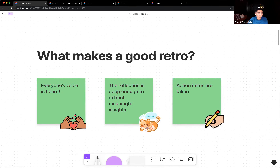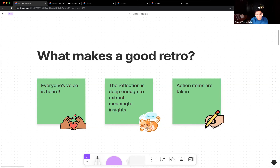What makes a good retro? Three things: one, everyone's voice is heard. Retros on a digital canvas really help with that — silent time for everyone to put their own ideas means no single voice dominates the room. Two, the reflection is deep enough to extract meaningful insights — the right prompts help you think about the problem from multiple perspectives. And three, action items are taken at the end — retros should result in actual change, not just something we do.